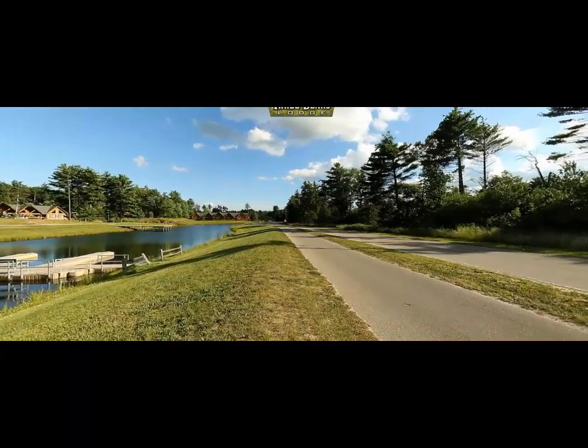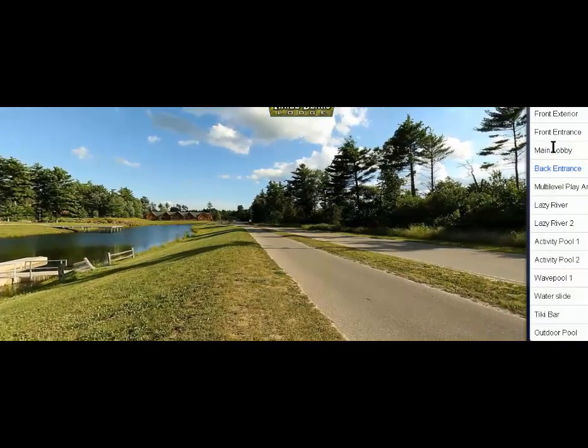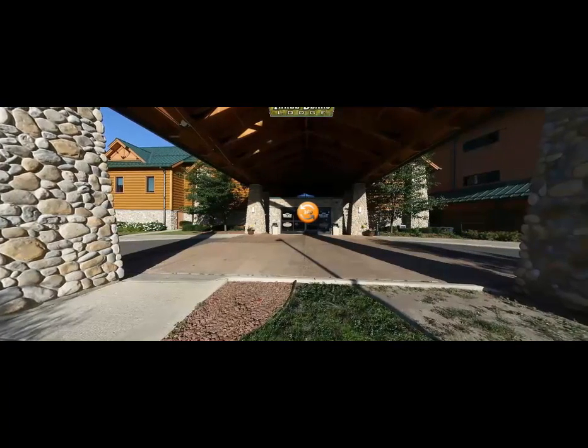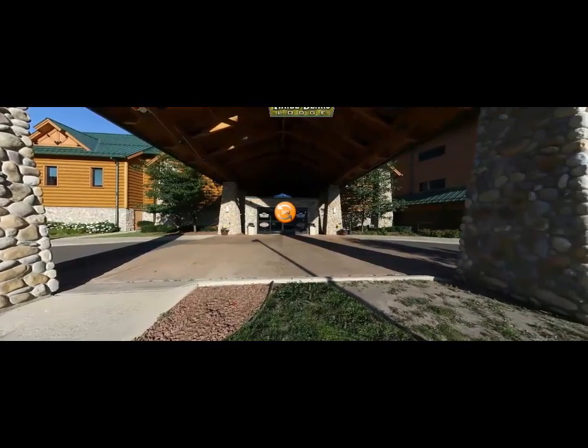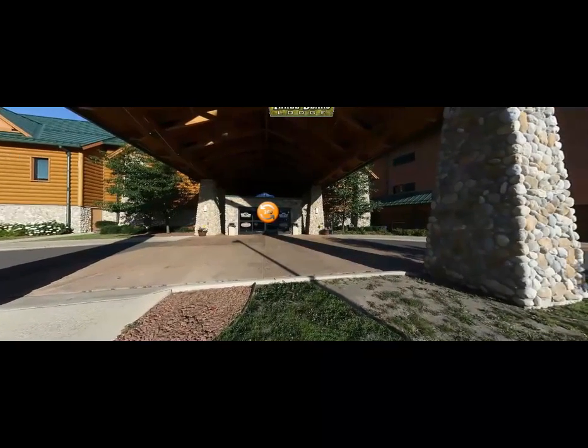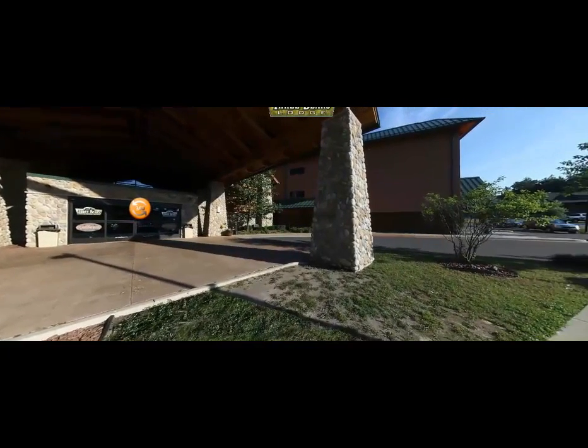It's a custom design. We had a mechanical engineer who was a former NASA engineer who worked on the project for about 6 months and produced a set of drawings that cost 3 times the budget for the mechanical equipment. And then we ended up hiring a mechanical installation firm to design and build the system, because he had redundancies in there that, you know, we weren't going to the moon.